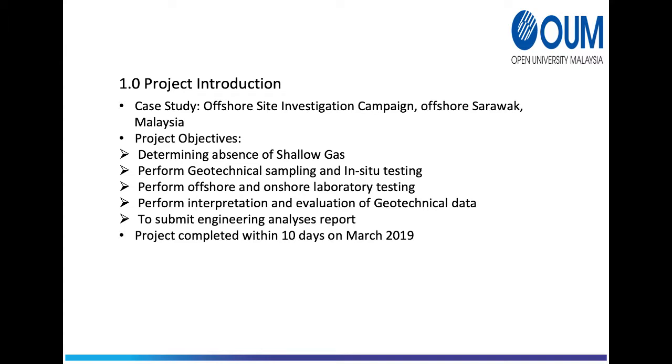The vessel was mobilized on 15 March 2019 in Labuan, and the duration of the project was 10 days. This project was selected as a case study for this assignment due to its complexities and associated risks. Based on the previous geophysical survey conducted in this location, it was identified that the location had a potential risk of shallow gas.